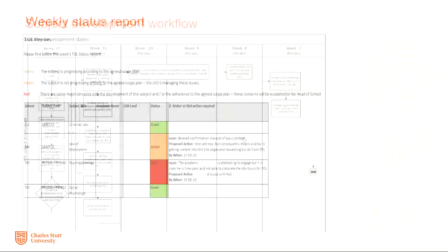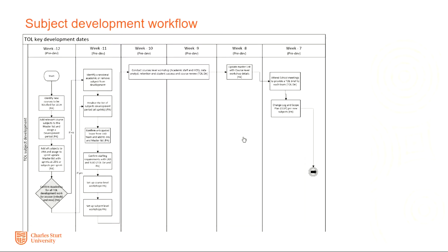And it's only half a map, but it shows minus 12 weeks out, we commence. So this is 12 weeks before the development period or the semester starts. And by -7, there's obviously -6, -5, -4, and there's activities associated with every single week. We're sending out academic emails, we're coordinating with staff, we're running heads of school meetings, a whole lot of things we're doing at various points.